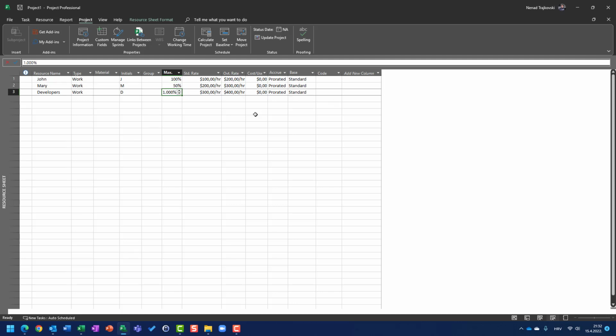We have 10 developers, and you can see that there are 10 of them according to this 1,000%, which means they can work 80 hours per day until they become over allocated, and that was explained in my generic resources video. So here once again, John 100%, Mary 50%, developers 1000%.